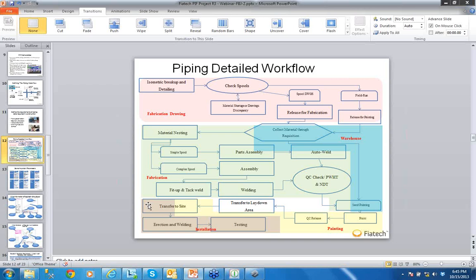If we can go with an approach that does not take the isometric into consideration, it will be, from a construction perspective, way better. But to achieve that, we are talking about changing the whole mentality of the design firm, because I believe the way they do the design is based on these engineering areas, and that's how they assign it, whether to subcontractors or to designers and so on. It should start from there.